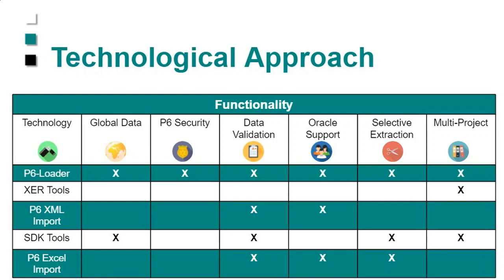So what happens is when you take an XCR and run it in, Primavera just says, yeah, it's good, and it runs it all in. However, it doesn't check in case you made a mistake. So I'll give you an example of a mistake one of our clients made. Somebody wanted to make an EPS code in one system into a global code in another system. So they took the XCR and they changed the scope of the code from EPS to global. The problem was they spelt the word global incorrectly.